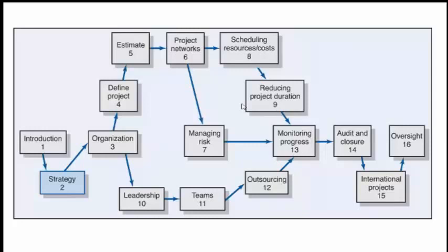Once you have entered something, what are the fields which are getting updated in the master file, based on which you give certain weightage to those input transactions, output transactions, query transactions. So add up all those function points, then you have total function points. Let's say you have 100 function points.